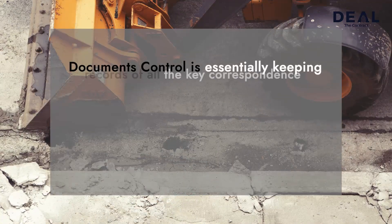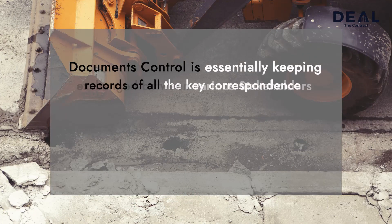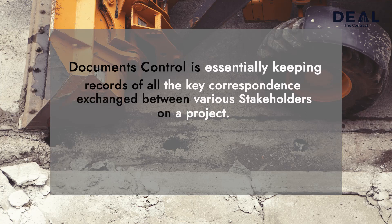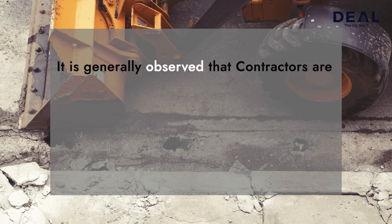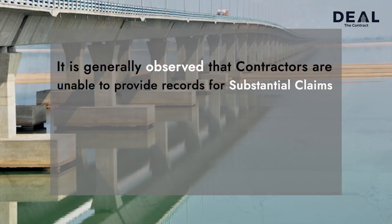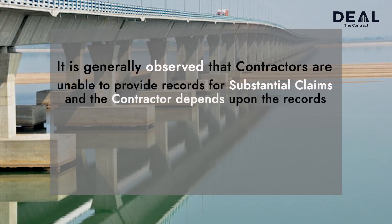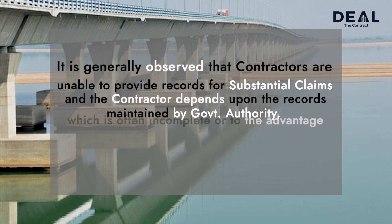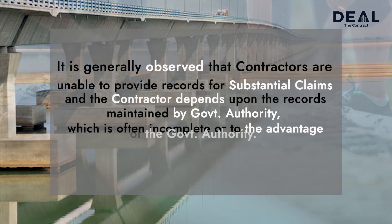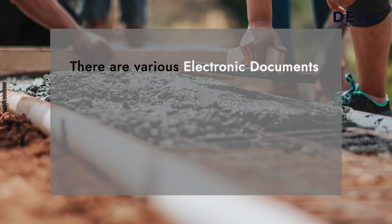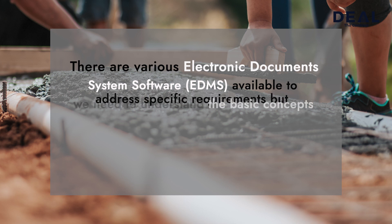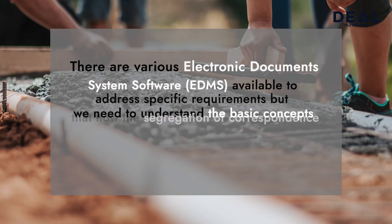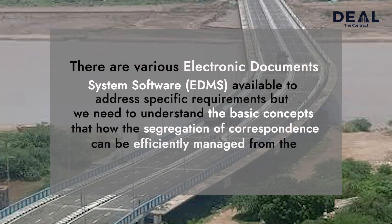Documents Control is essentially keeping records of all the key correspondence exchanged between various stakeholders on a project. It is generally observed that contractors are unable to provide records for substantial claims and the contractor depends upon the records maintained by the government authority, which is often incomplete or to the advantage of the government authority. There are various electronic document systems software available to address specific requirements, but we need to understand the basic concepts of how the segregation of correspondence can be efficiently managed from the perspective of construction claims.